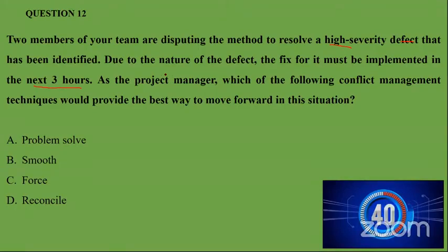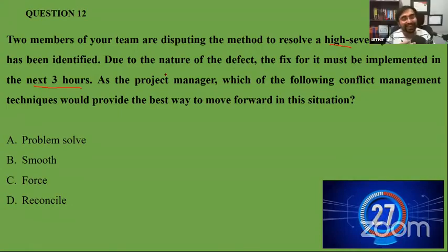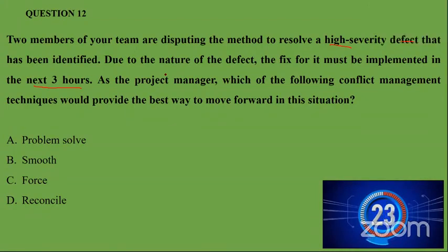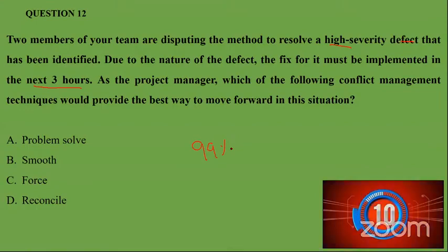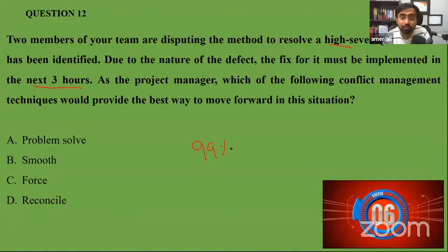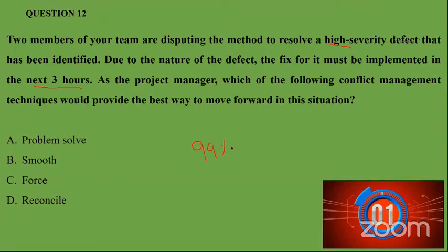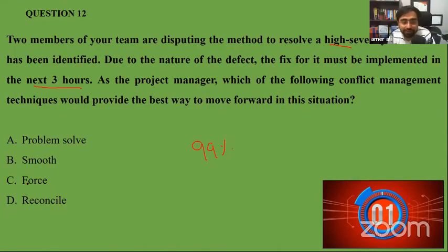The best will be... now this becomes an interesting thing. It'll be force actually. That's why I was smiling when you said servant leader, because most of the time, 99%, you are always right that as a servant leader, you never do the forcing. But you are running out of time. It's a high severity defect. You need to look for the project also. So you need to force the decision and move forward. Thank you very much. So the answer would be C option. You need to force it because of the time criticality.